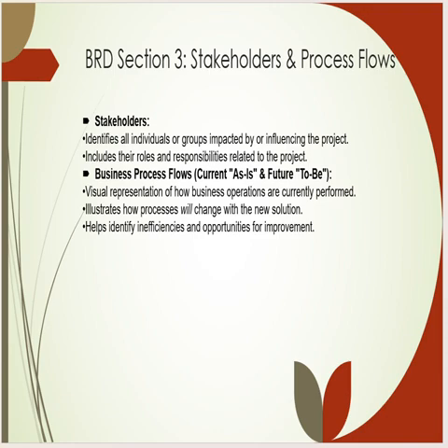Okay. Then move to the stakeholder and the process group. In stakeholder management, we should use a RACI matrix. RACI stands for responsible, accountable, consulted, and informed. Then we identify all individuals and groups impacted by or influencing the project. Stakeholder management also helps with the requirement gathering technique, to gather the requirements from the different stakeholders to achieve the objective and the goal of the business. So the stakeholder is the most important part of that. It also includes the roles and responsibilities related to the project.